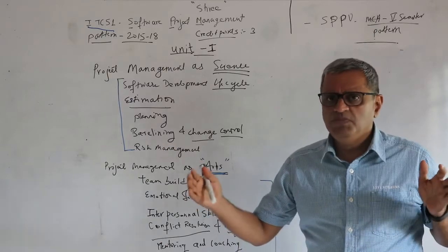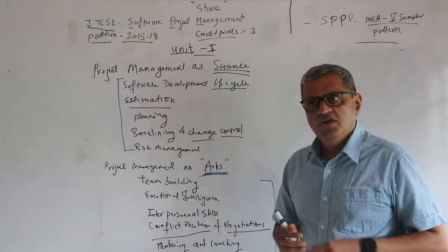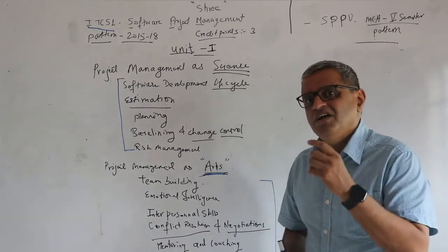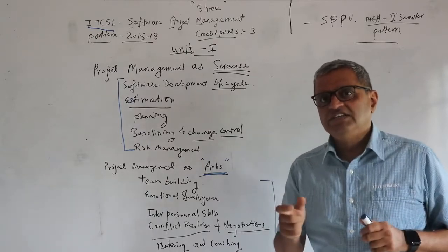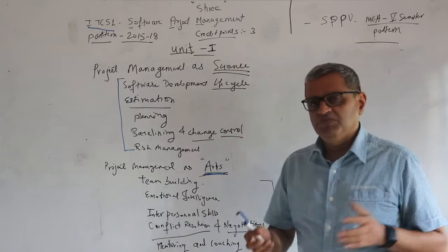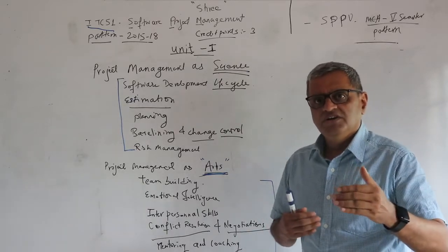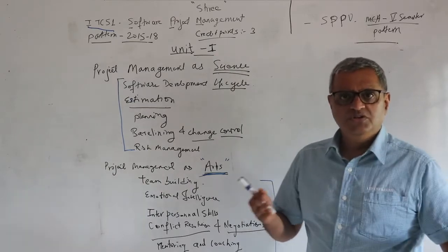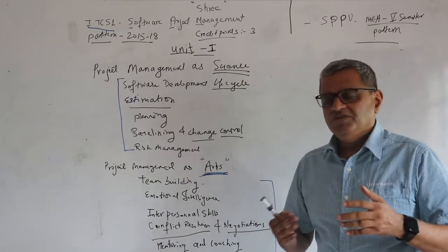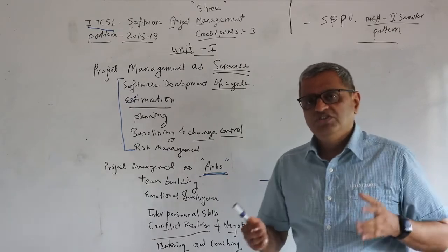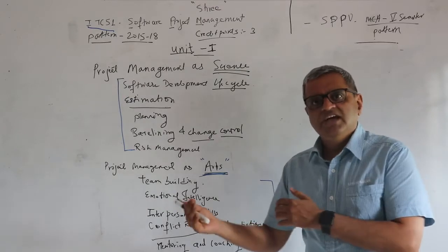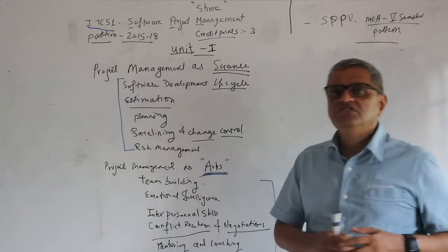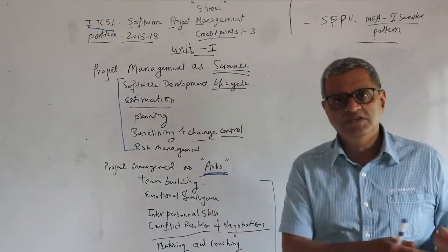So there is a proper methodology, a proper process that gets followed, and every phase has its own deliverables which act as an input to the phase following it. For example, the requirements phase would give birth to use cases or user stories or a requirement specifications document, which is used as an input by designers to develop a high-level design, and then comes a low-level design based on what technology you're going to use, whether it's Java or C++ code.